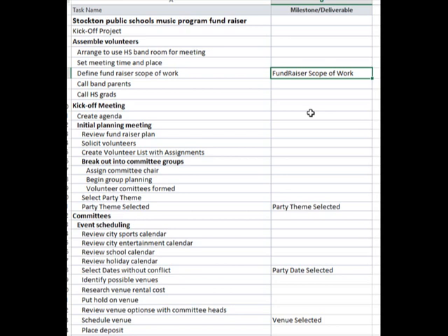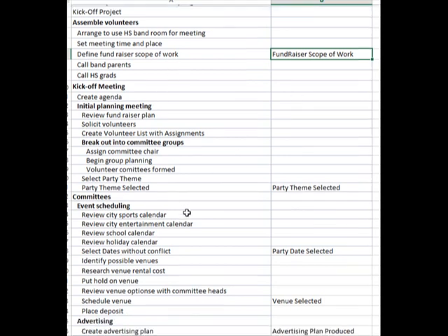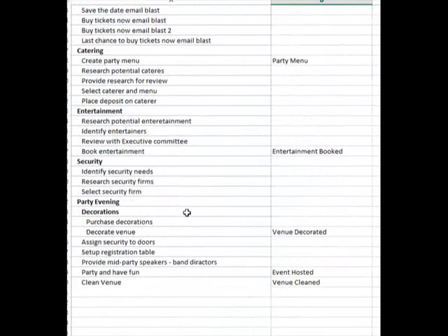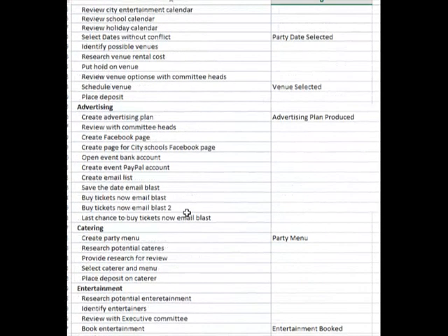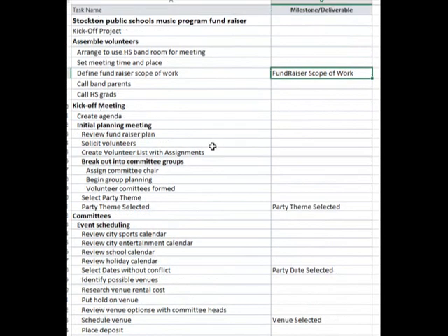Here's how we connect the work breakdown structure to the charter, and in our next assignment, we will turn the work breakdown structure into a schedule. So everything is kind of consolidated as one piece. What I've done here is I've taken what is essentially 70 separate tasks and decomposed them into a series of phases and a series of activities, and in some cases tasks and work tasks. I do that and I use indentation, bolding, etc. to help me better understand or see the actual work.